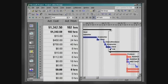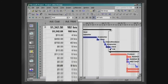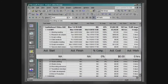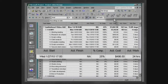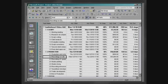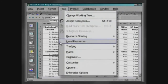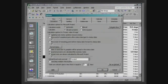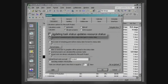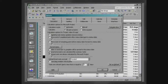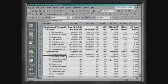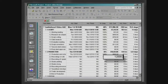The columns Actual Cost and Actual Work determine what really happened during the execution of the project. When the status of Finish of a task is filled in, the project automatically updates these columns. Click on Tools, Options. In the Calculation palette, disable the options Updating Task Status, Updates Resource Status, and Actual Costs are always calculated by Microsoft Project if you prefer to manually fill in the values of these columns.